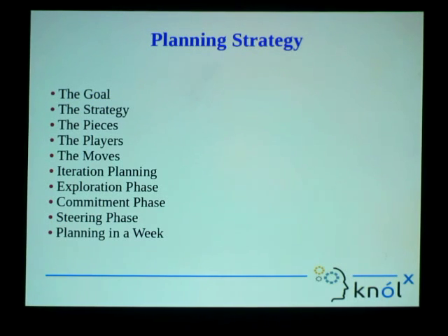For example, if the requirements of the stories change every 2 days, and your sprint is of just 2 weeks, you need to adapt according to the new requirements. But it is up to the development team's estimation whether they can include that change in that sprint or not. If you can, then do it. Otherwise, tell the business people or the client that we can do it, but it will not extend the sprint, and we have to drop some other task for this.